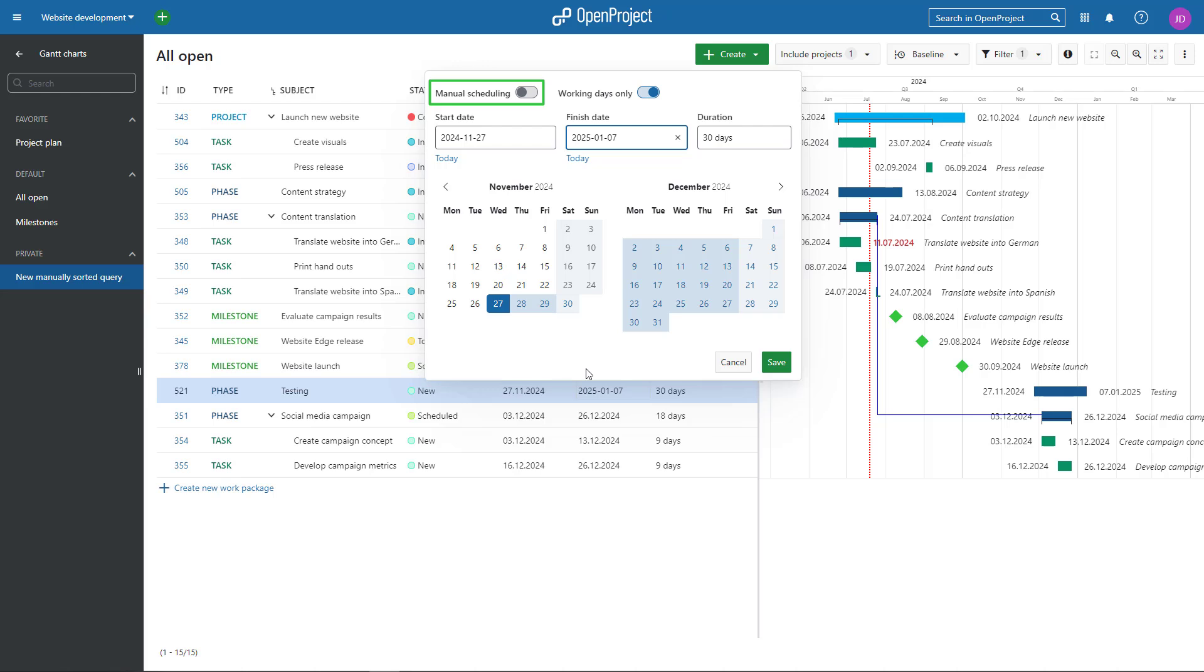Whereas automatic scheduling sets start and finish dates of a parent work package based on its children. It is referred to as bottom-up scheduling.